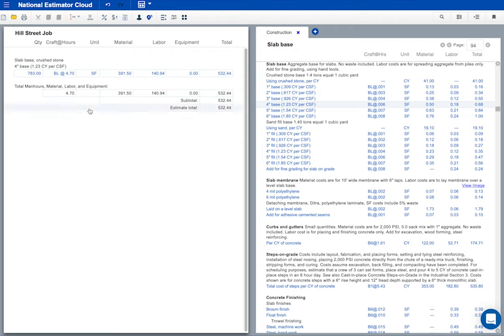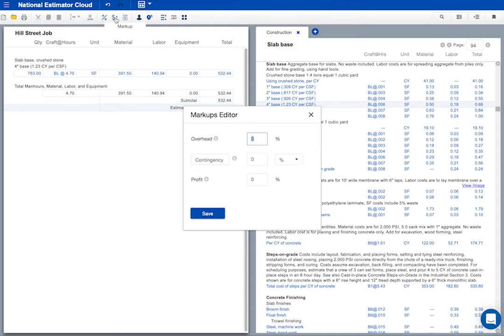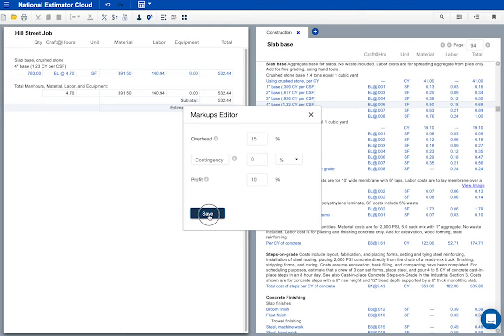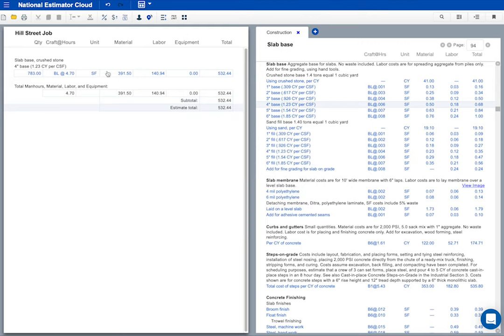Let's add some overhead and profit to this job. I'll click the markup button. I'll type percentages for overhead and profit. Let's enter 15% for overhead and press tab four times to advance to profit. And we'll enter 10% for profit. That looks okay. I'll click save. How's that? It looks okay to me.